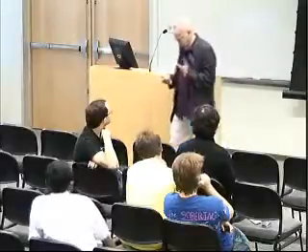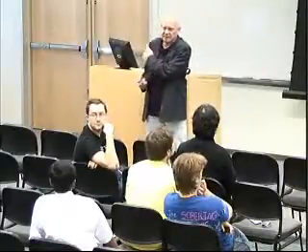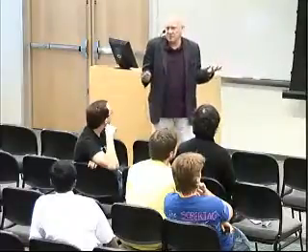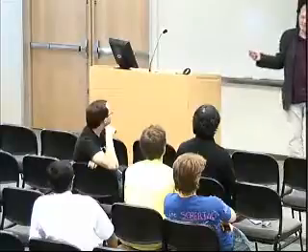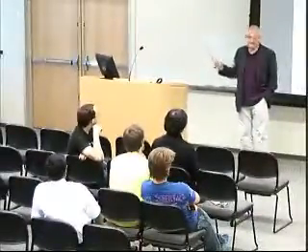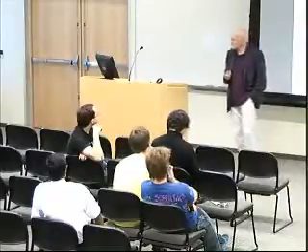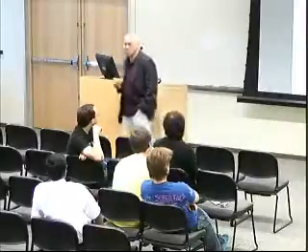So I have looked into, of course, agile technologies as well as Scrum, use of this burn down. What is fundamentally different here is that for each sprint, you assume already you know what the features are you want to implement. That is of course completely opposite to what I'm doing, because that's the most important decision. If you pre-decide that, and then try to find the right sequence to implement them, your decision space is basically reduced dramatically already, right? The other thing is, typically you just look one sprint ahead of time, and this is a short 2, 3, 4, maximum 6 weeks ahead of time. That is again a strong limitation of the decision space. You do not look into any stakeholder preferences.